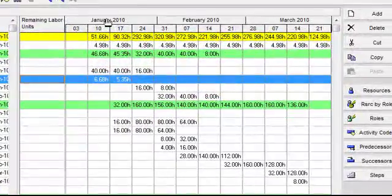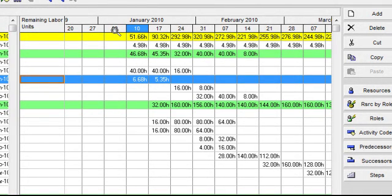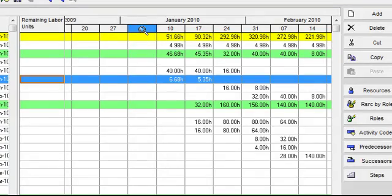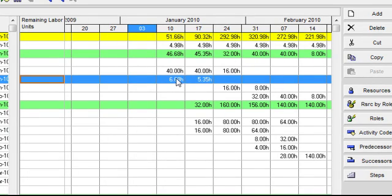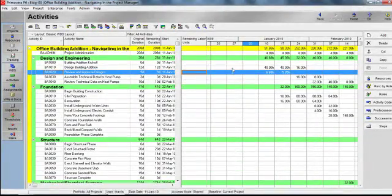If I point to the major time scale, you can see my mouse becomes a pointer — I can then click and drag and use it as a scroll bar. If I point to a minor time scale element, in this instance the week, my mouse becomes a magnifying glass; I can then click and expand and contract the width of the cell. When I look to the left of the time scale, I can see what data is currently displayed in those cells — in this instance, it's remaining labor units. I can see the remaining labor units by time period for each activity, and that data rolls up through the various grouping bands, which in this layout represent my work breakdown structure.